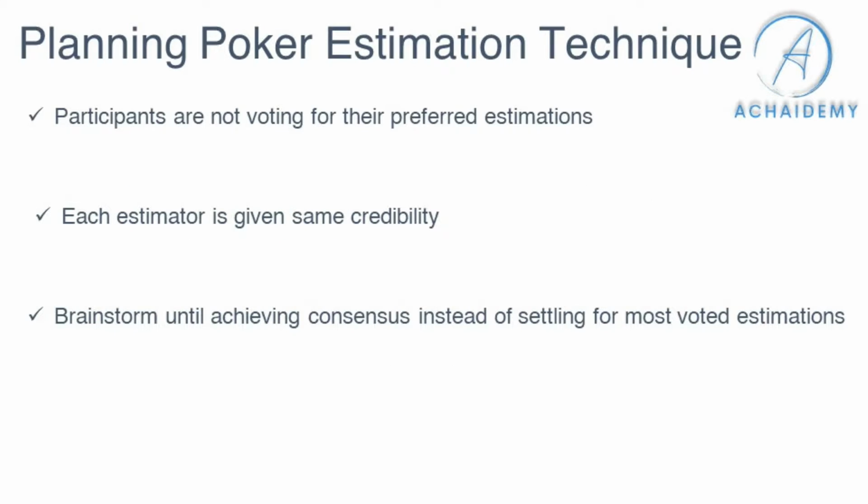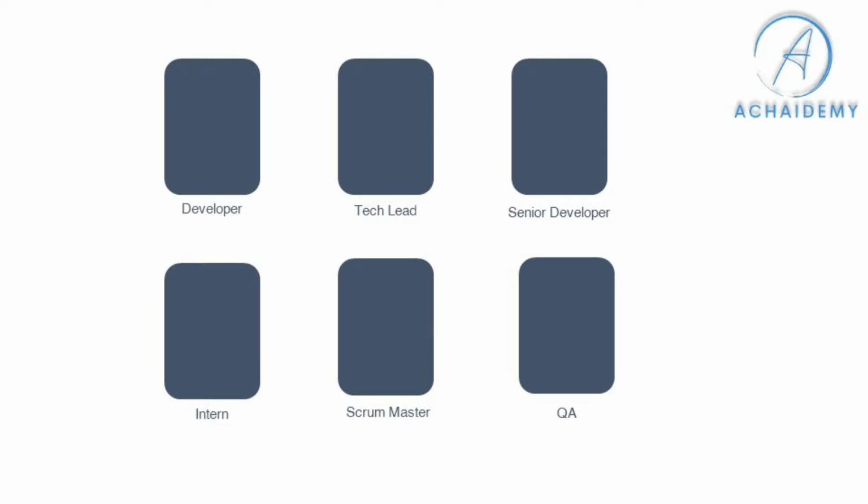It works, right? In a sprint planning, when you start off, a particular story is picked up, and the product owner explains the user story, the details of the features, what is required, and how it should work. Everybody in the team then joins a brainstorming session where everybody understands the story and asks their queries to ensure there's clarity of understanding.